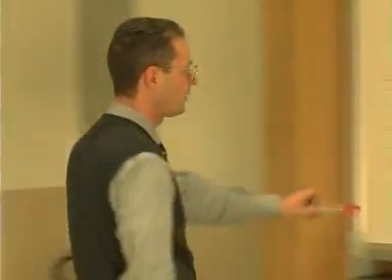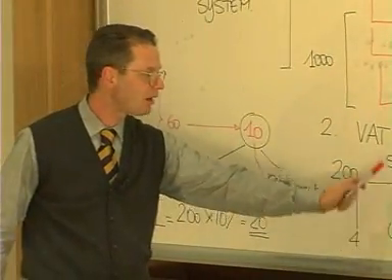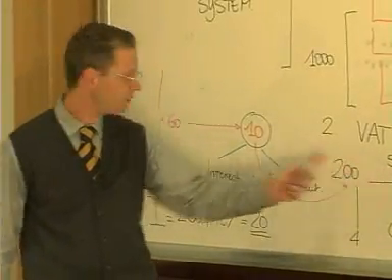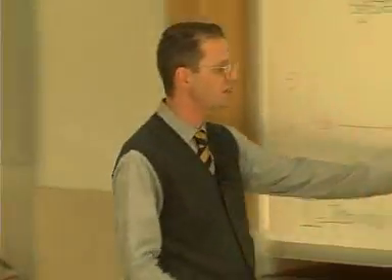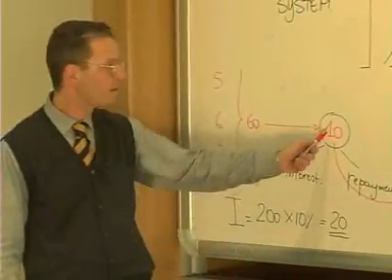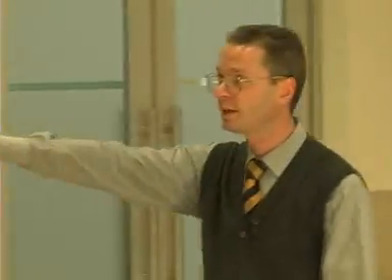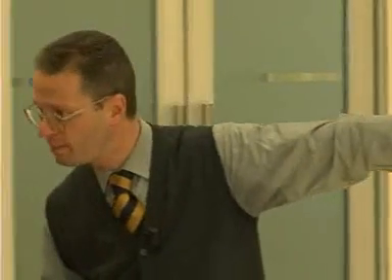So, in year number 5, look, you have generated value-added tax whose amount is 20% times 50, the amount is 10. This amount of 10 should be split into the two components, payment of interest and payment of capital. Since the value-added tax facility produces in that year an amount of interest of 20, this amount of 10 is used immediately to repay the interest. The remaining amount of interest, namely the remaining 10, will be paid using all the other cash available from the project, and no capital repayment will be recorded during year number 5.